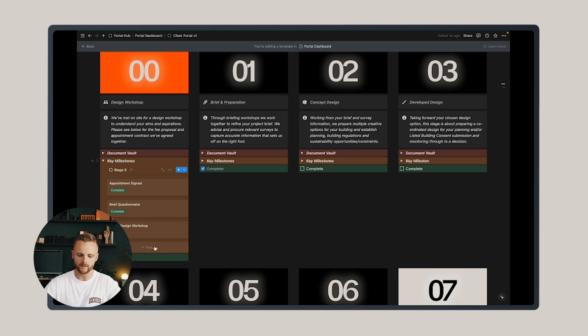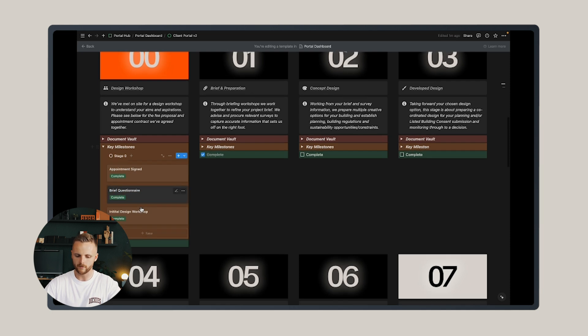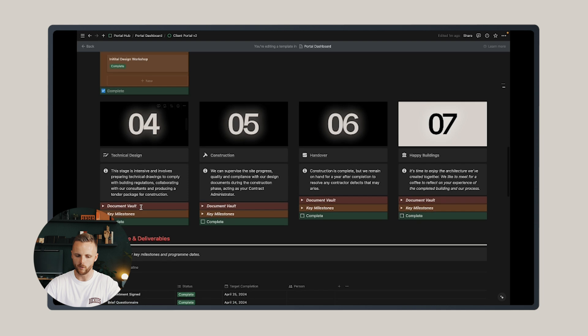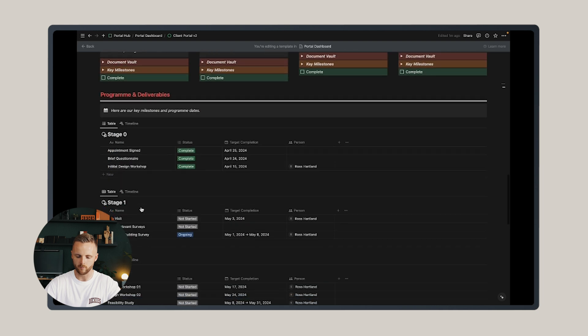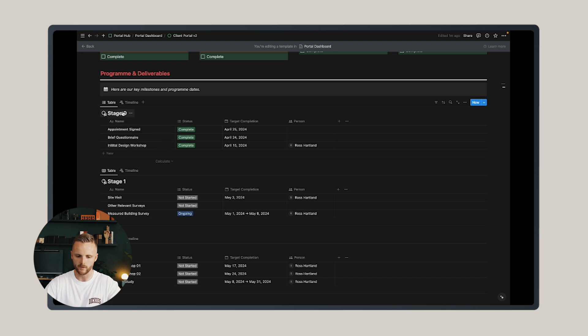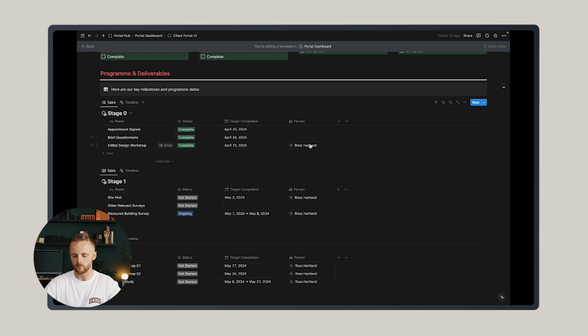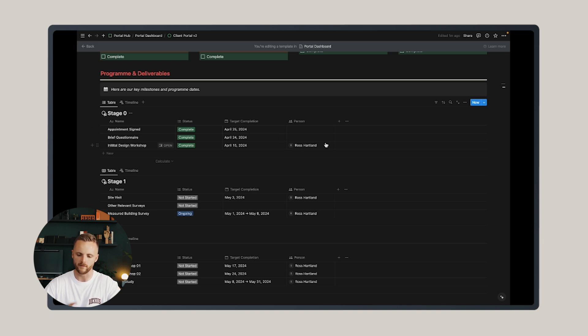Importantly, these milestones are linked to the section below, which is the program and deliverable section. So you'll see here that I have three deliverables associated with stage two. They're all complete and the target completion date is highlighted here. And you can also tag who is responsible for completing each item, whether that's yourself or your client.